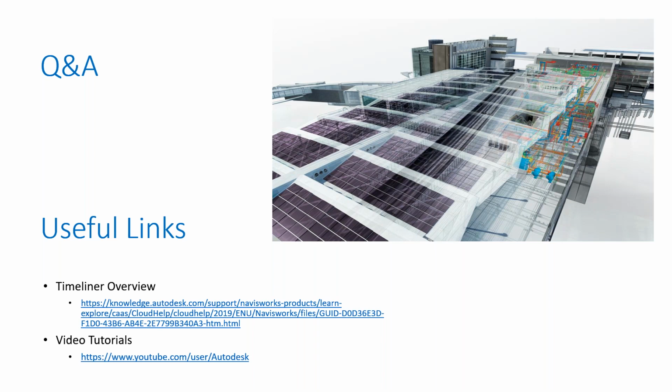And Jacob's asking the question, can you simulate also temporary structures and equipment? Yes, absolutely. One of the task types that we looked at in there was temporary. So that's for things like scaffolding, for example. You can just show it in green as it appears, and then when its end date is there, it will change to whatever color you like, or disappear completely. So yes, you can simulate things appearing and then disappearing.